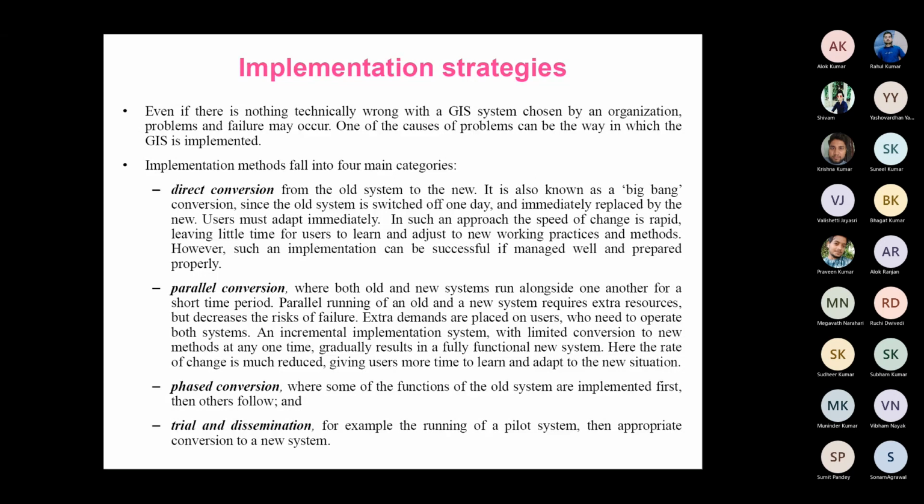So parallel systems are comparatively very costly, but they are useful when there is a lot of risk involved, when the chance of failure is high. In that case, a parallel conversion could be used.